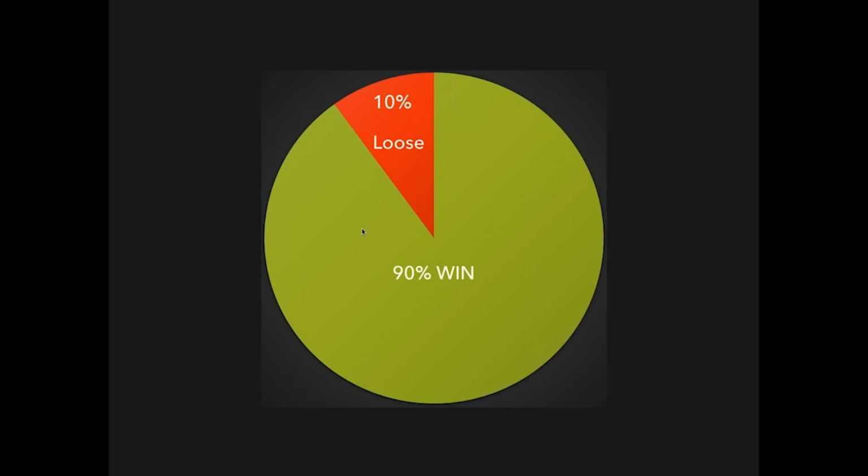And the last tool that we can use is what's known as the equivalent bet. And this one is fun. The way it works is I'm going to show you this. Imagine we have this wheel that if you spin it, you have a 90% chance of winning, but you have a 10% chance of losing. Now, you're going to bet on winning in the wheel or bet on your estimate. You're going to decide between the two. Those who decide to take the wheel, spin the wheel and have a 90% payout right there, they tend to be underconfident in what their estimate is.